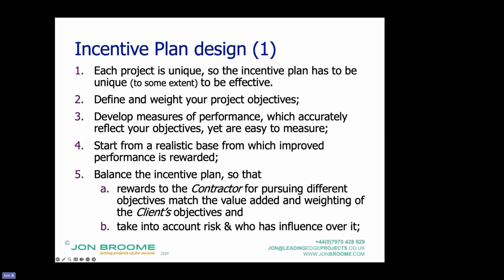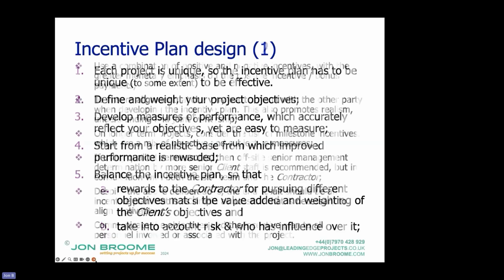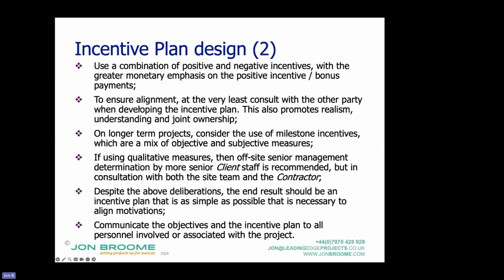Now I've put this in sequence, but you've got the following considerations, and I'll actually go to the second one first. One of the things that my research found years ago was that incentive plans that were jointly developed, and that doesn't necessarily mean the client doesn't put forward their ideas, but they were discussed with the contracting party, were far more effective than client-imposed ones.